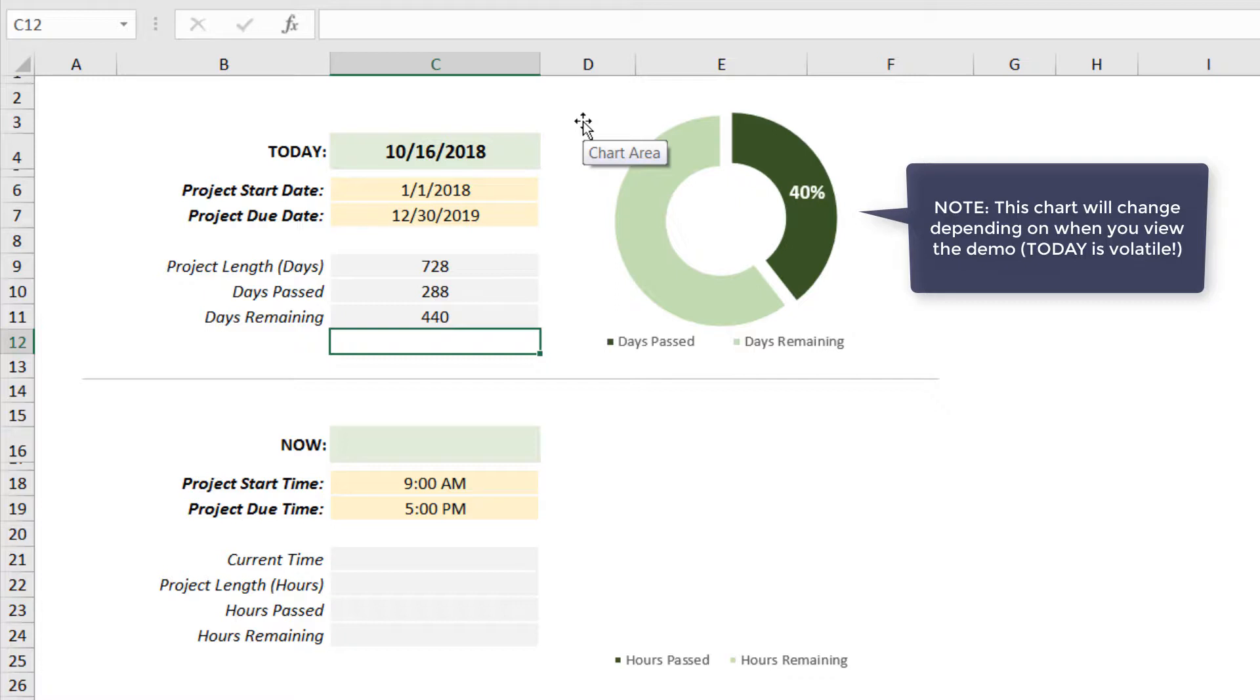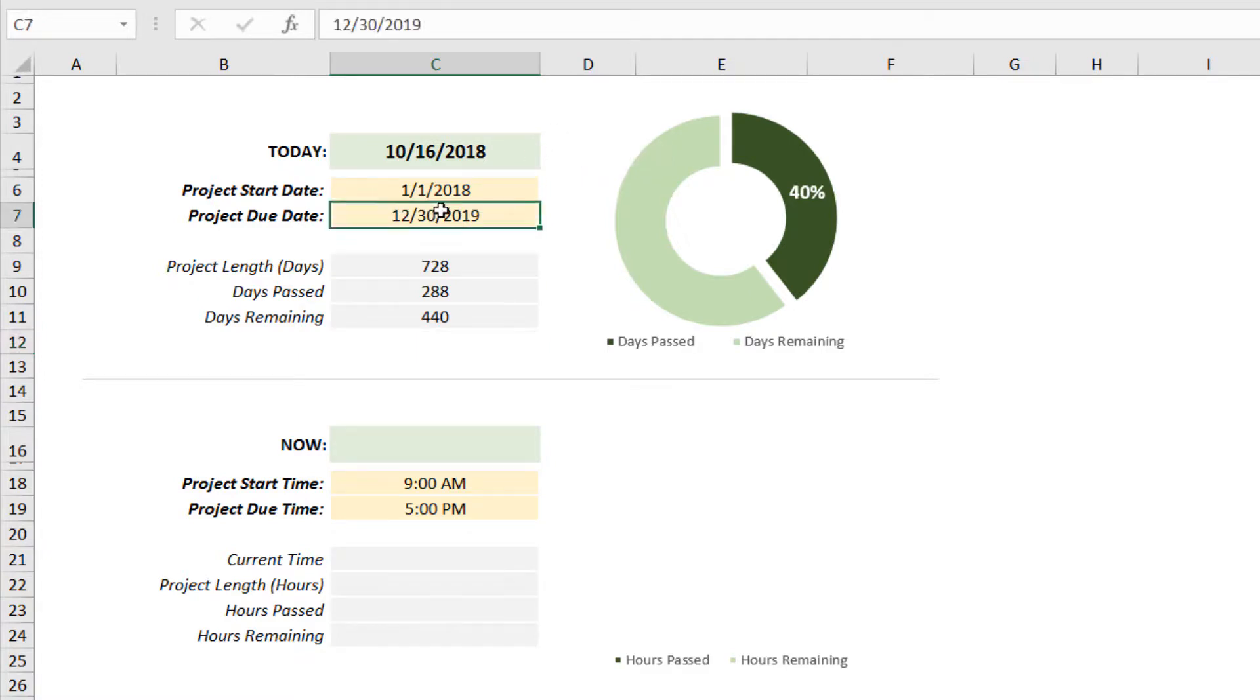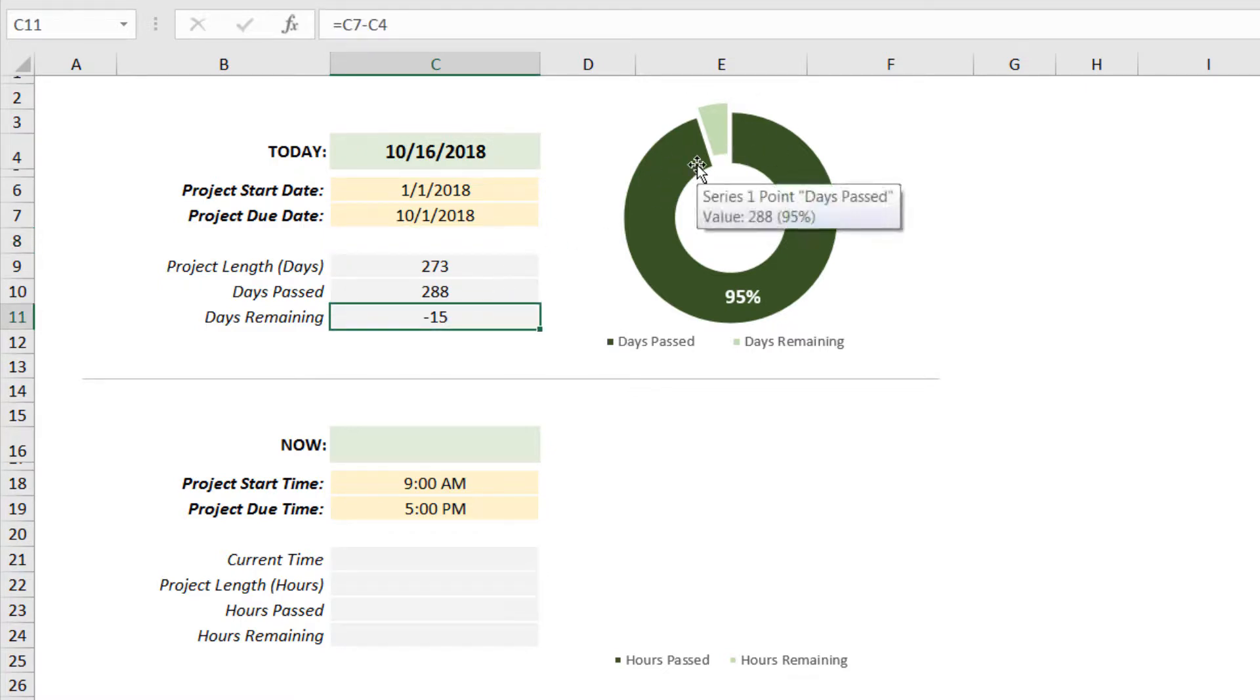The one tweak I'll make is that if we populated a due date that has already passed, like October 1st, 2018, you'll see some weird stuff happen. We get a negative days remaining that gets plotted on the chart in a weird way.